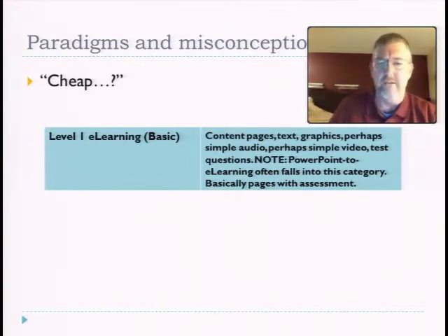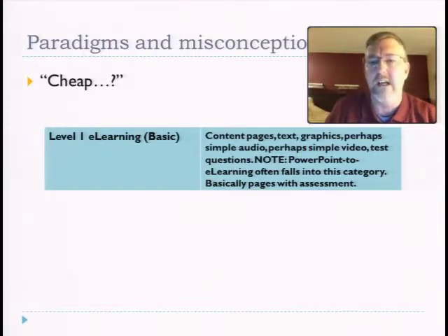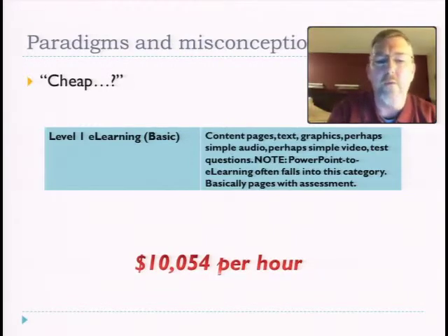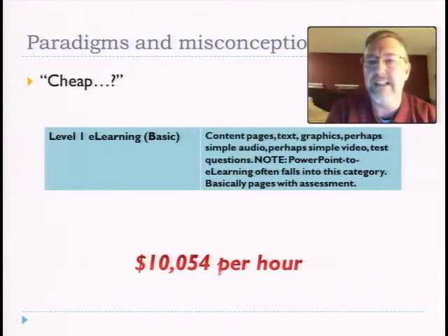Okay, you've got some content pages, some text, some graphics, maybe some simple audio like a narrated PowerPoint, those kinds of things, and some test questions at the end. Now, it was staggering here. Just to speed things up, I'm going to go ahead and show you the number, but Brian found that on average it took over $10,000 per hour of tangible and intangible dollar expenditures to create 1 hour of basic e-learning.